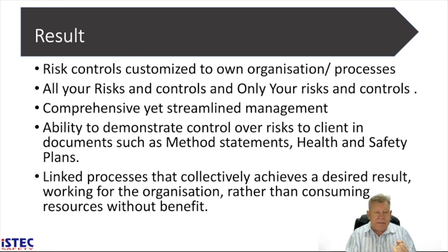A method statement is simply a response to the risks, where you will tell the client how in this project you are going to address the hazards and the risks associated with them while you are executing the task and delivering the service. You can also demonstrate to your client that you've got a good health and safety plan.